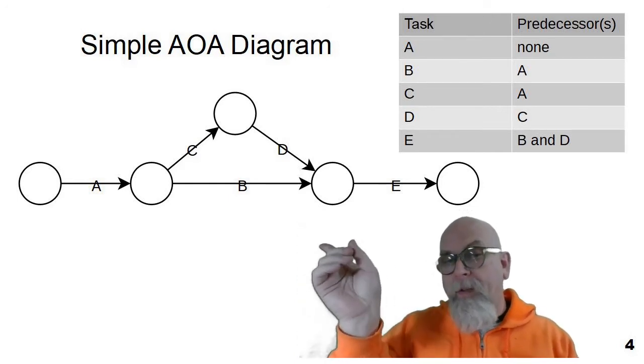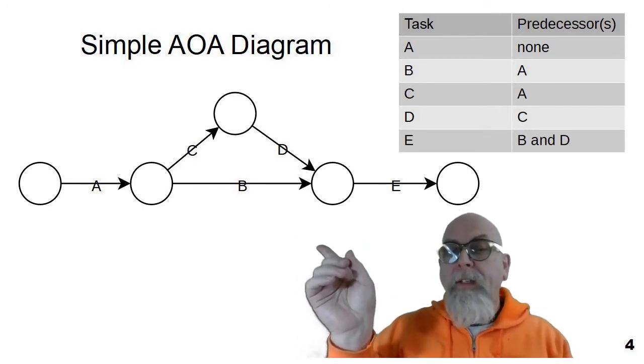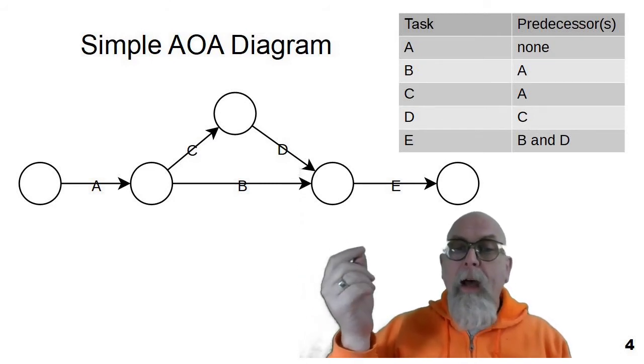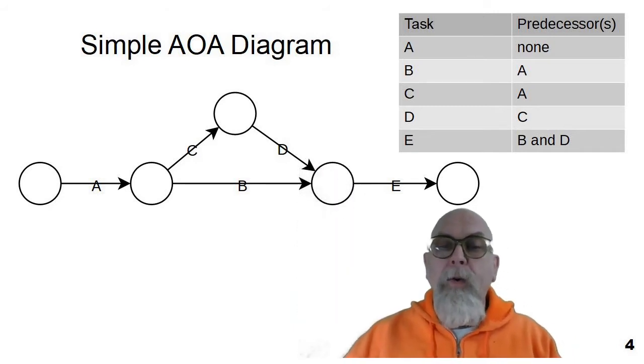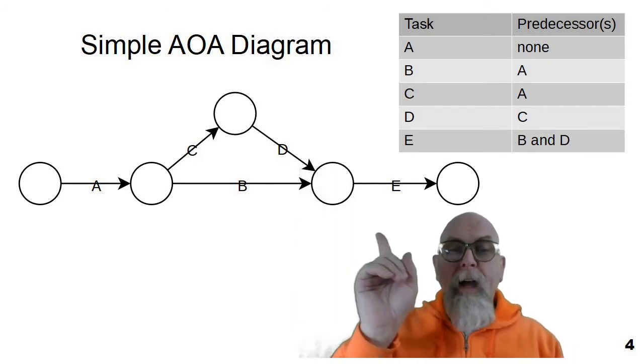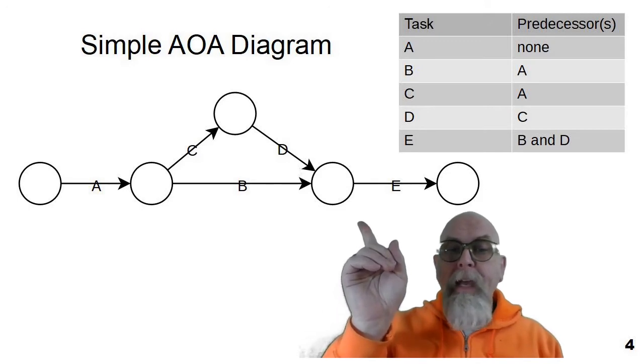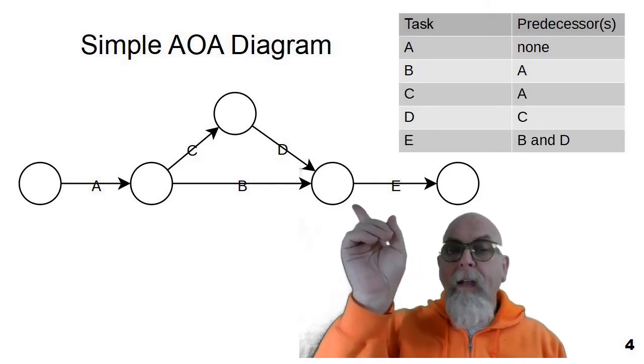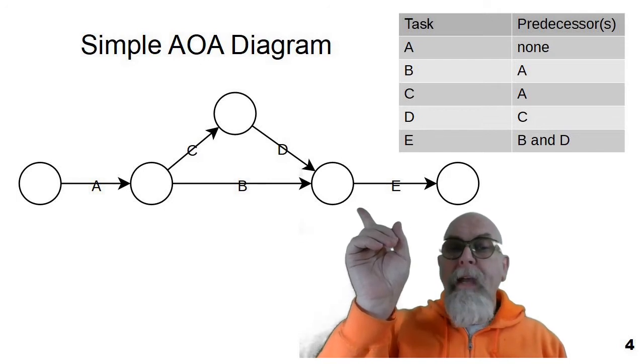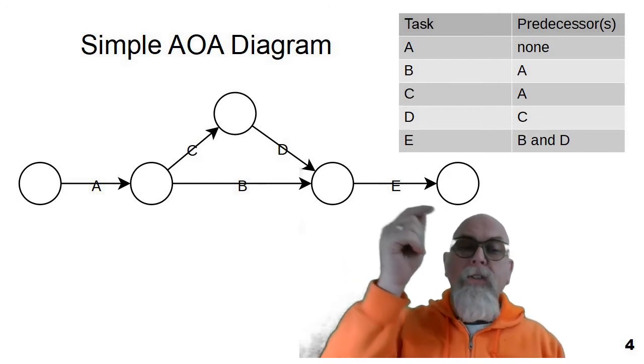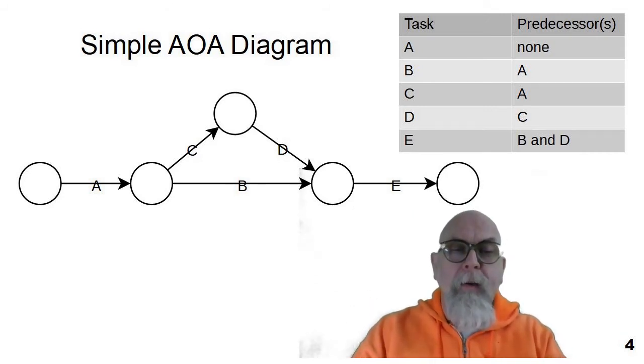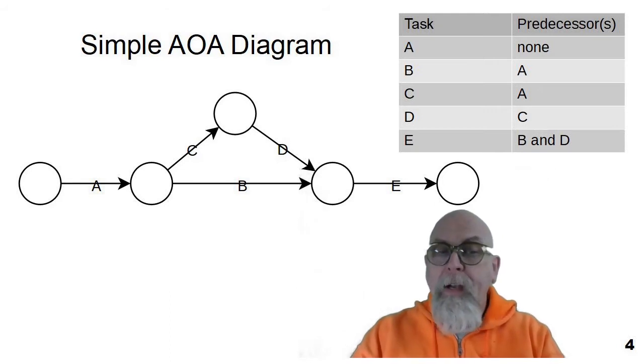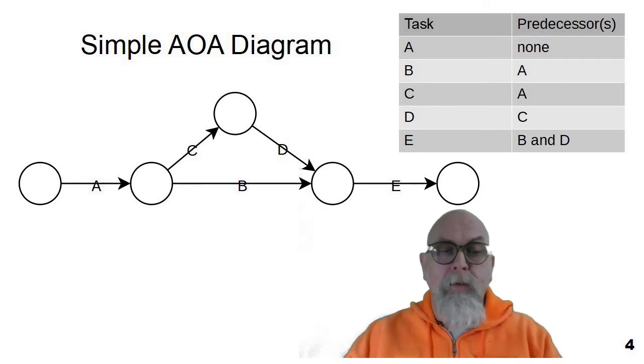For instance, this node, the node over here, would represent when A is complete. The node up there would represent the node where C is complete. And this node would represent when B and D are complete. So if we're here at this node, B and D have arrived, and we're now going to start the activity E. You can see how this diagram differs from the activity on node diagram, the AON diagram. But you will see these in industry, and you will see people use these and draw these.